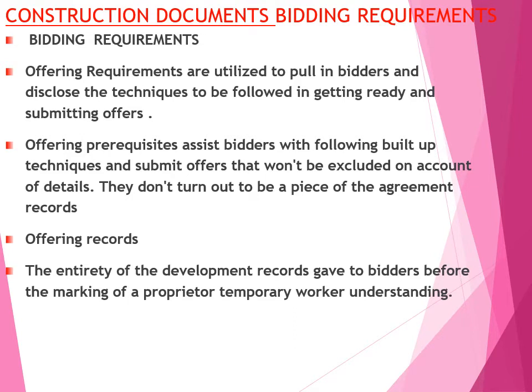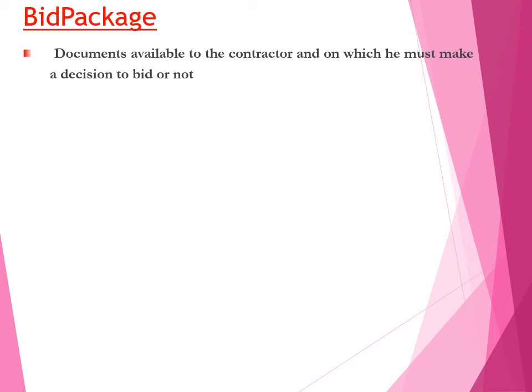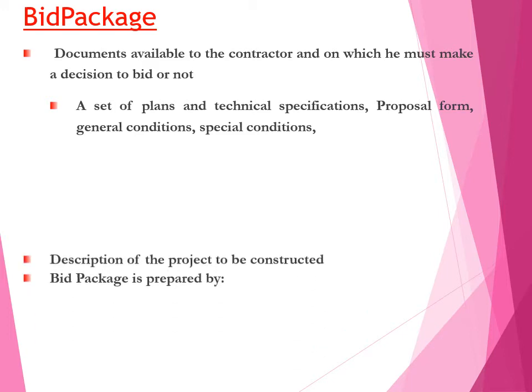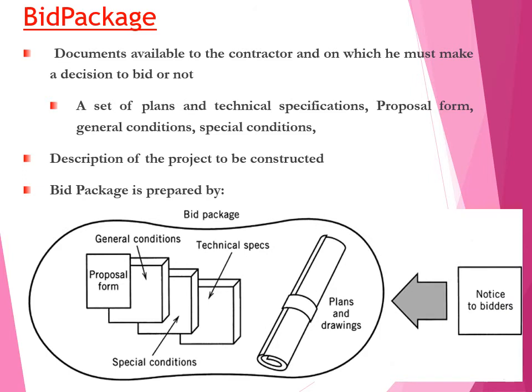The bid package consists of documents available to the contractor on which he must make a decision to bid or not. It includes a set of plans, technical specifications, proposal forms, general conditions, special conditions, and a description of the project. Bid packages are prepared consisting of general conditions, proposal forms, technical specifications, plans, and drawings.